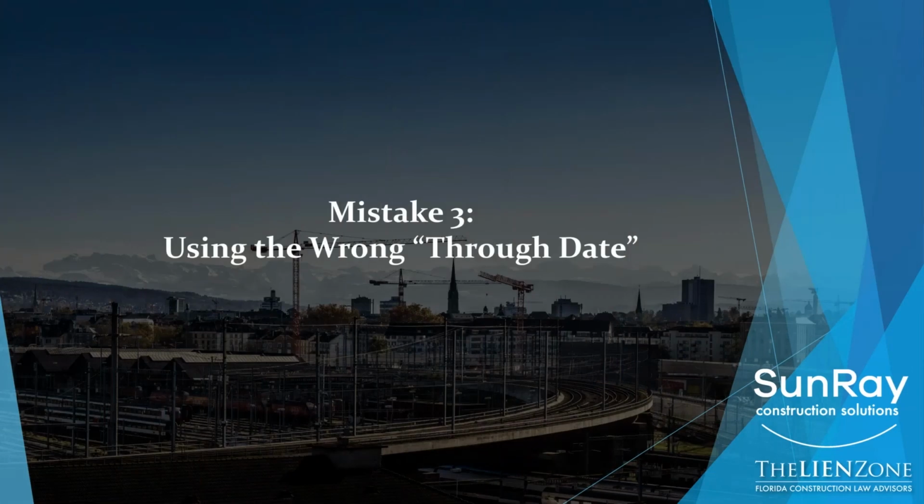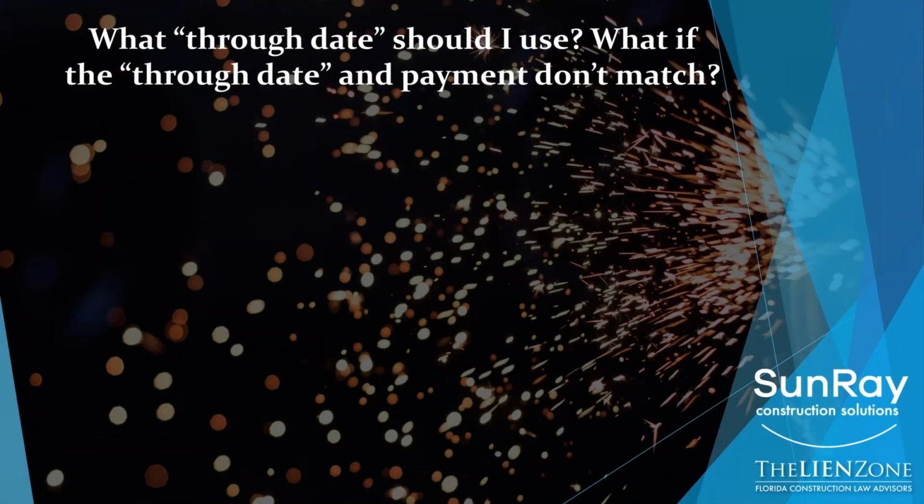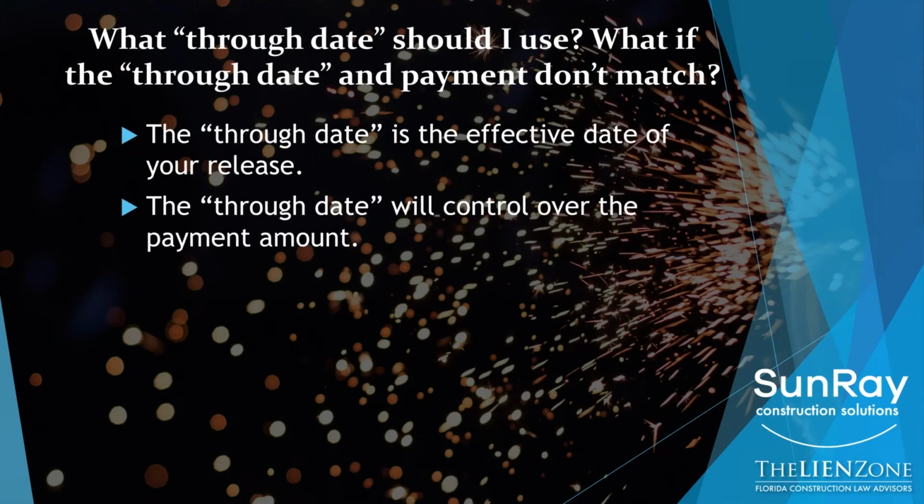Mistake number 3, using the wrong through date. Let's talk about the through date and why it's important. What through date should you use, and what if the through date and the payment don't match? So you need to remember that the through date is the effective date of the release.